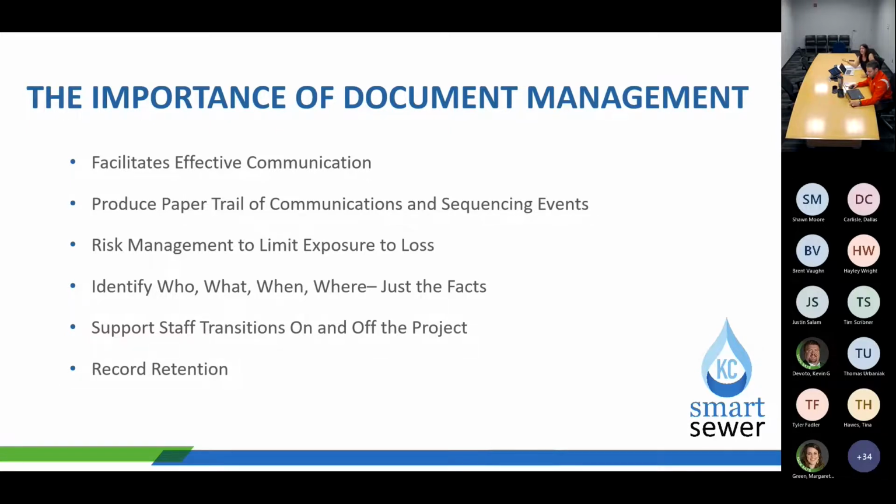If there's an existing RFP or RFI that is in continuation of work and that you're aware of, if you have an existing RFI on your project site and they're working on it today, okay, well, hey, this crew worked at this station from 0+00, and they ended at 0+20. Then they worked on this RFI and finished it, or they'll be continuing it tomorrow.